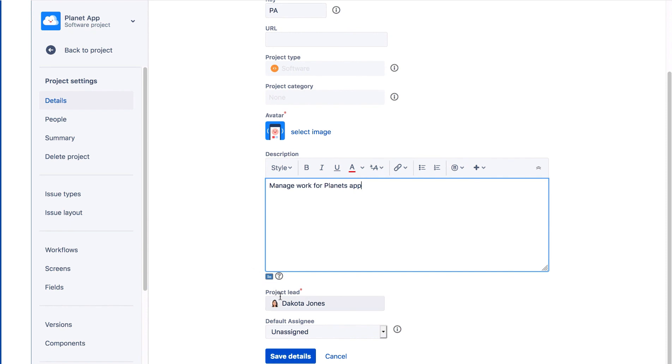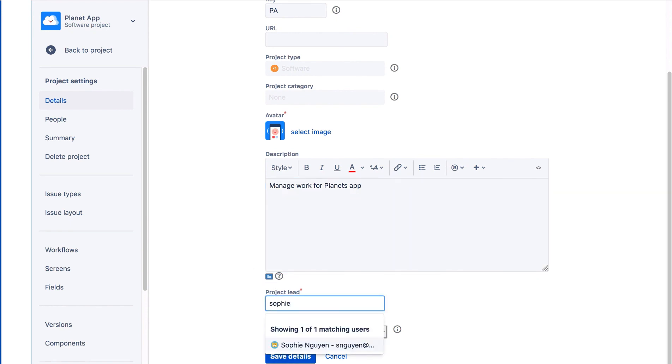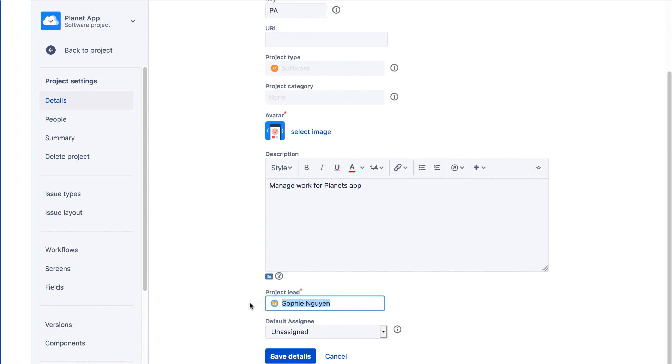And for Project Lead, we'll start typing Sophie and select Sophie Nguyen. The Project Lead is the person who manages the project within and outside Jira. By default, Jira assigns the person who created the project. We'll discuss project roles in more detail in the next module.